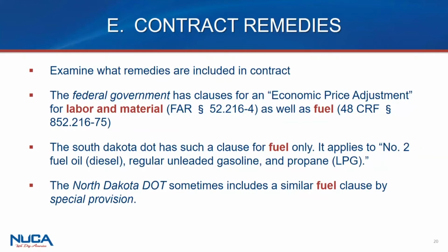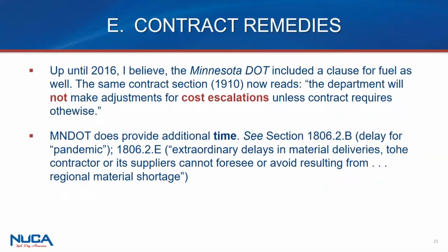That's on a federal level. I note, having done a lot of DOT work, you'll periodically see DOT escalation clauses for fuel. And asphalt as well. Right. Again, that can also give you further support when you're asking for something. Hey, again, I'm asking you to do something that others are doing. Here's some examples. MnDOT, Minnesota DOT, used to have one that paid for fuel. They bailed on that, and now they said they'll give you time, but not dollars.